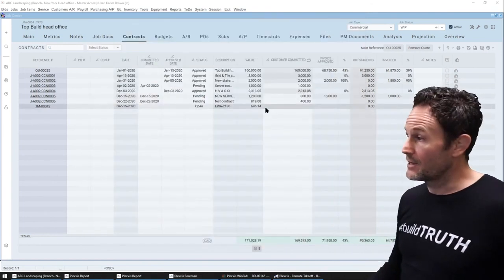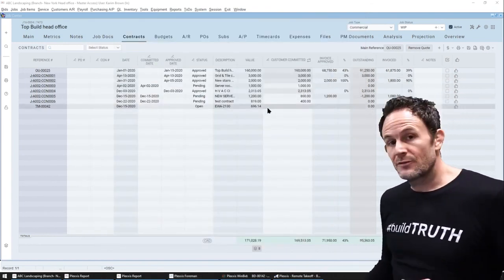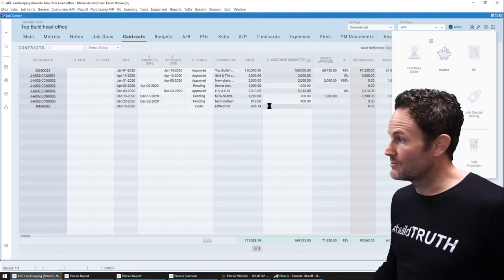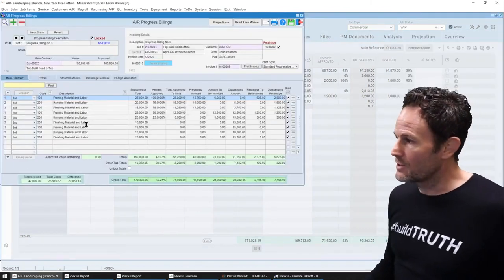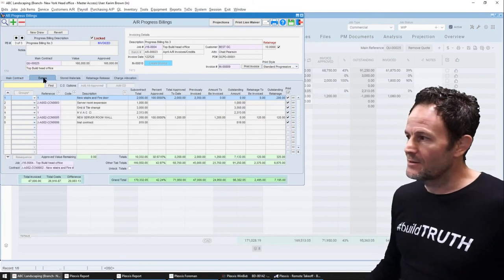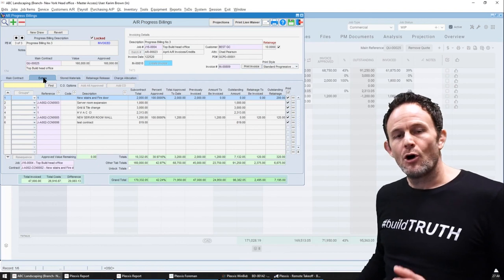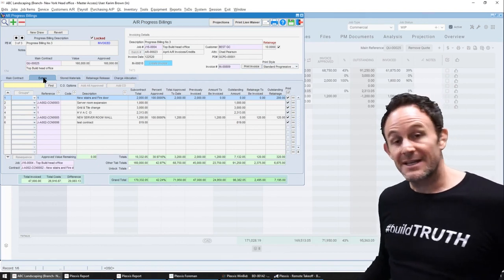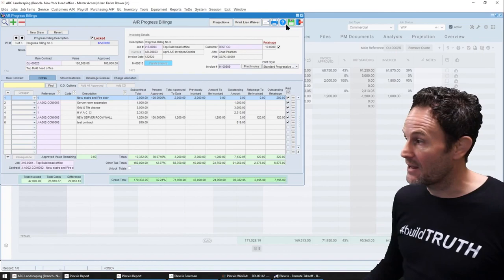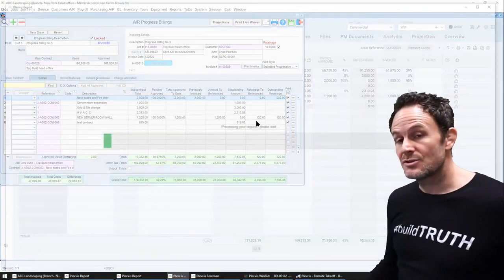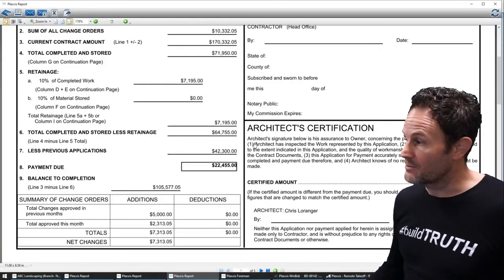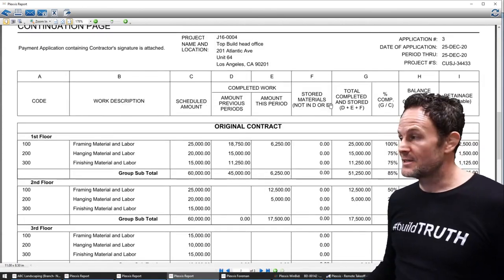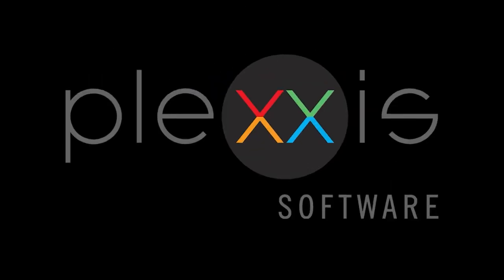Now on that note, the connected workflows do of course extend to billings. So when I open up a progress draw here, I can come into the extras tab and automatically add all approved change orders at the click of a button. I can even go in and select pending change orders and add them to the pencil payout, so the GC knows what's coming down the pipe and creating the actual invoice itself is just as easy. We are Plexus!